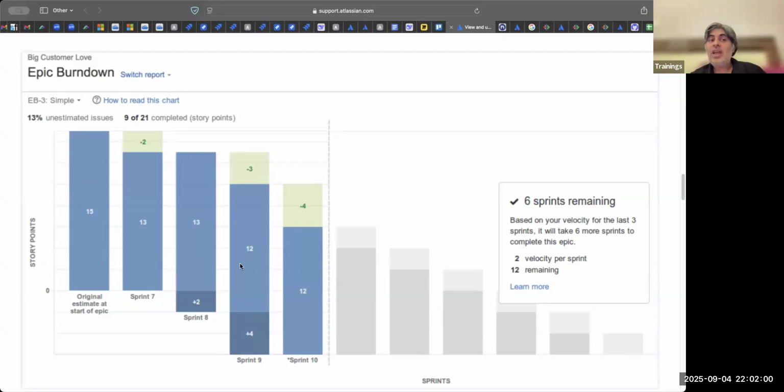On an epic level, they are interested in how much these epics, which are basically your features, have left. They want to know how many points of work a particular feature is. So they would know, okay, this feature is 15 points. Okay, this sprint, this happened. They will say, okay, we have only done maybe 3 or 4 stories in this epic, so a lot of work is pending. So the epic burn down chart tracks the epic's progress.